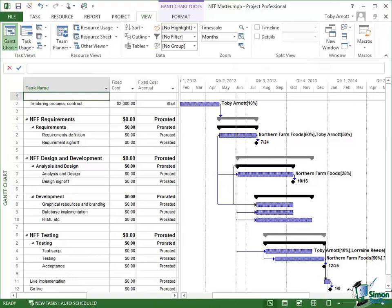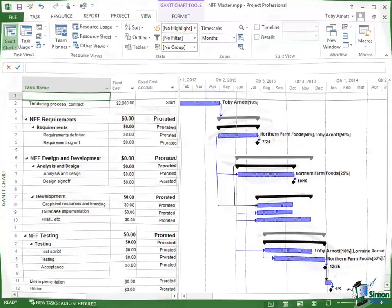I'll also look at the likely costs. Let's assume that we've got all the computer equipment we need to do the development. We may need to buy the odd bit here and there, a little bit more hardware to do some testing on. But apart from that, we've got very little in the way of additional costs. Graphical resources and branding work, for example, is being done either by our own people or by agencies. So from a point of view of direct material use, we're talking about a pretty small amount. Let's suppose that I think, let's allow $5,000. Let's say that just for budget costs, apart from resources of course, let's allow another $5,000 and that's the figure I'm going to put into my budget.